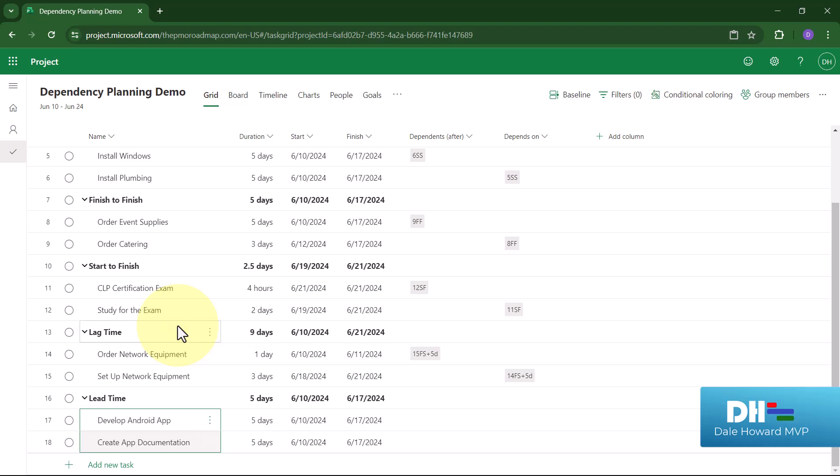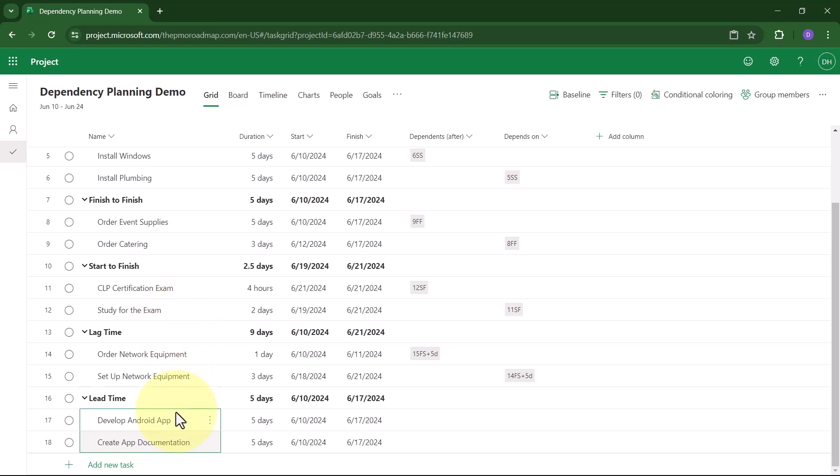On my last pair of tasks, I'm going to develop an Android app. I'll work on that for five days. But when I'm two days away from finishing, we're going to start creating the app documentation. In this situation, I need two days of lead time on a finish-to-start dependency.